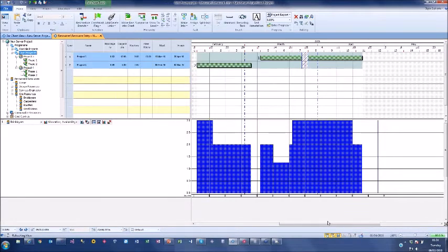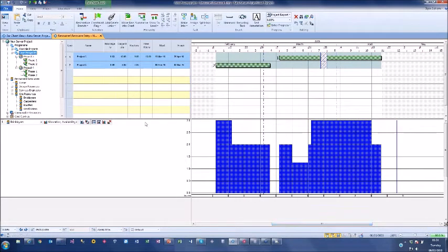If I go to live projects, I can see the combined resource requirements across all those projects. So very quickly, I'm now starting to see how my resource requirements are needed. So this is where I'm looking at multiple projects with multiple resources allocated across those.